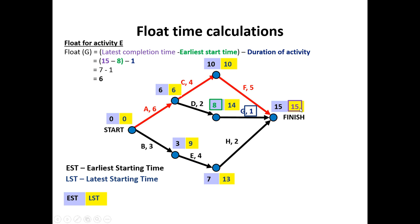Activity G, latest completion of fifteen. Subtracting an earliest starting time of eight. Gives me seven minutes available to get the project finished. I only require one. So I have again six minutes of float time. And finally H. I have a latest completion time of fifteen. Subtract from that the earliest starting time of seven. Means I have eight minutes in which to complete this task. I only require two. So this one also has a float time of six minutes.